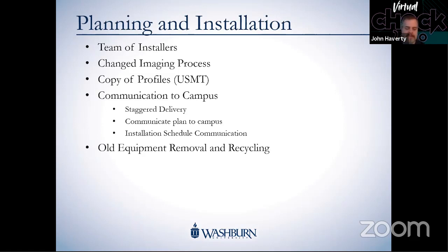More on our imaging process. We did that down on the dock. We were able to do about 48 systems at one time. It took anywhere from 40 to 80 minutes, depending on whether it was a solid state or standard drive. We'd start all those, and while they were running, the team would be getting other things ready, maybe contacting people and setting up the installation times to meet with people to get their systems installed.